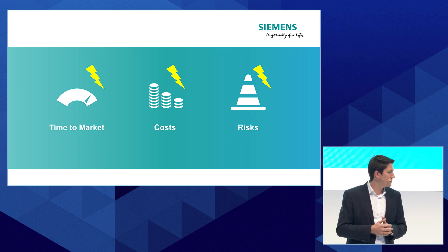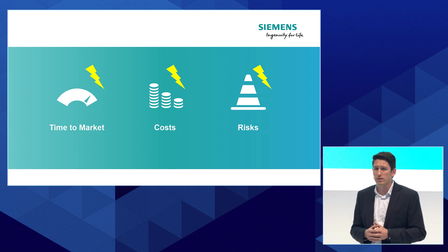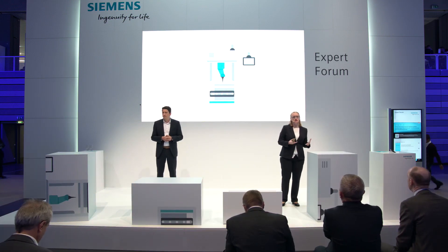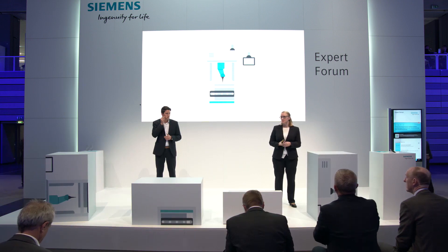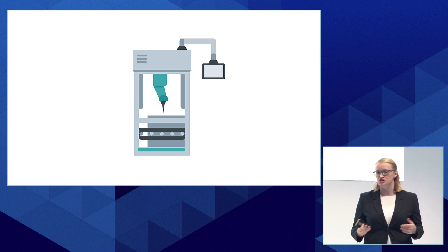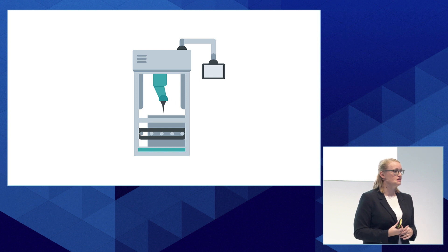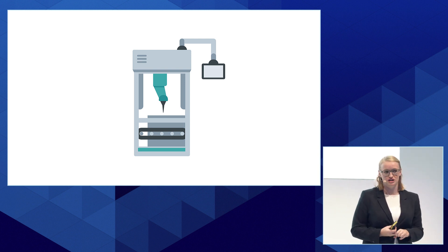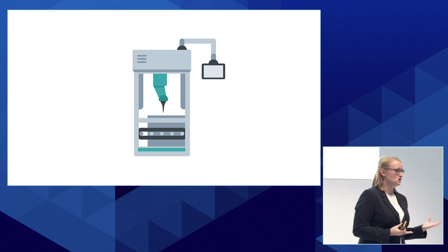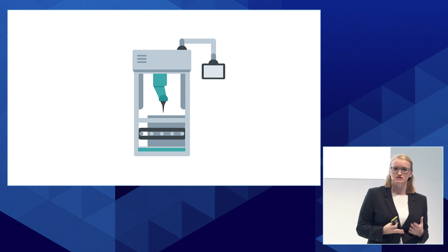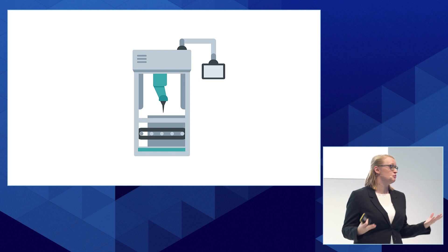But the question is, what are the effects of these challenges? Let's assume we have to develop this machine. In the traditional development process, each development step is proceeded serially. This means, first of all, you define the mechanical concept of a machine. Afterwards, you start with the mechanical construction. This is then followed by the electrical design, and after the electrical design is finished, you can start with the automation engineering. Each development step is dependent on the previous one. If any unexpected errors should occur, then the whole process is delayed.